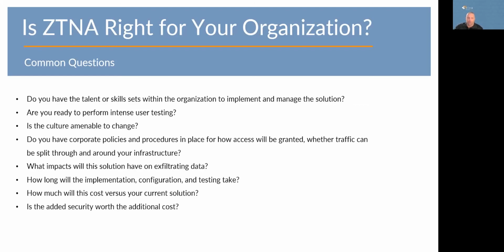Are you ready to perform intense user testing? This is one of those solutions where you cannot just drop it into an environment, flip a switch, and then expect it to work. There's a lot of testing that's involved. There's a lot of configuration. Ideally, you want to test it from a role perspective. So if I have a finance department, maybe I'm going to set up and test with 1 or 2 finance folks. And if I think I've got it right, I can roll it out to the entire finance team. Same thing from a system administration or an engineer perspective or a security team perspective. But you're not going to get away from the training and the testing.